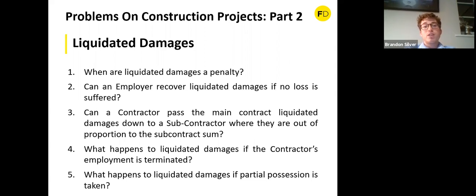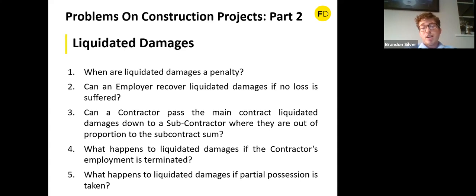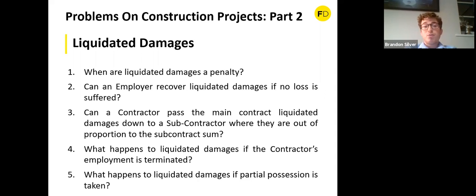Third question: can a contractor pass main contract liquidated damages down to a subcontractor where they are out of proportion to the subcontract sum? Yes — the only issue is again to ensure it is not a penalty clause. If the subcontractor is not on the critical path and did not cause delay to the works, it would likely be a penalty. But if the subcontractor is, say, an M&E contractor on the critical path and you can show they caused delay, passing the liquidated damages down would not be a problem.